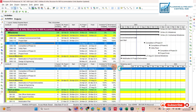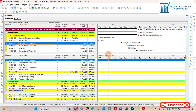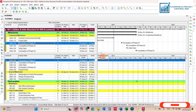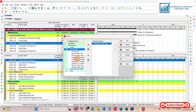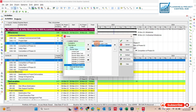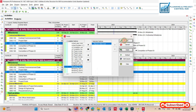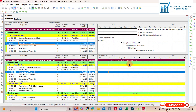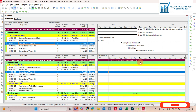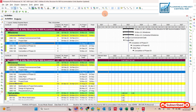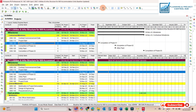We have already opened it here — just move it up. Open here Plan Value, Plan Value Cost. Remove the unnecessary one, apply. Make sure this must be on a weekly basis because we are going to make the S-curve on weekly basis. So it should be on weekly basis — now this is on weekly basis.